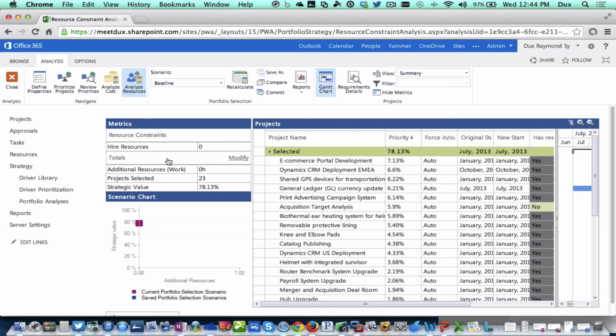As they put in all that metadata, based on the criteria, executives can look at all the projects based on what our strategic drivers are and what the priority is. This is called demand management. Now you can think about what we're going to work on and not work on. Y'all with me? And you can put a whole workflow approval process around this too. This is huge because a lot of companies just keep doing what the business requests. But now you can go back to them and say, this is not in alignment with our strategic driver. Y'all follow me? Okay. Huge.